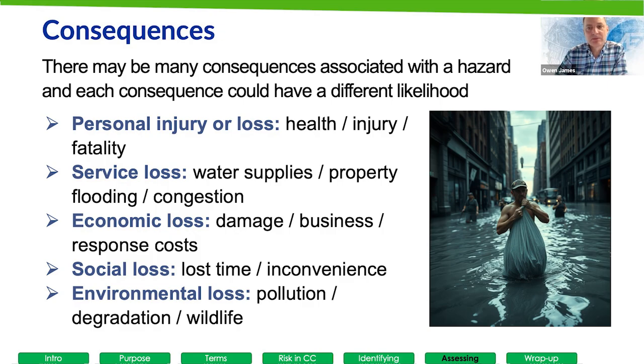So consequences. When we think about consequences, again, it's a brainstorming activity. If this event happens, what will be the impacts? That's the kind of questioning approach that we're taking. Will people get hurt? Will services be impacted? Will there be other losses? How many people will be impacted? What areas will be impacted? How long will they be impacted for? Are they vulnerable communities or are they critical resources?